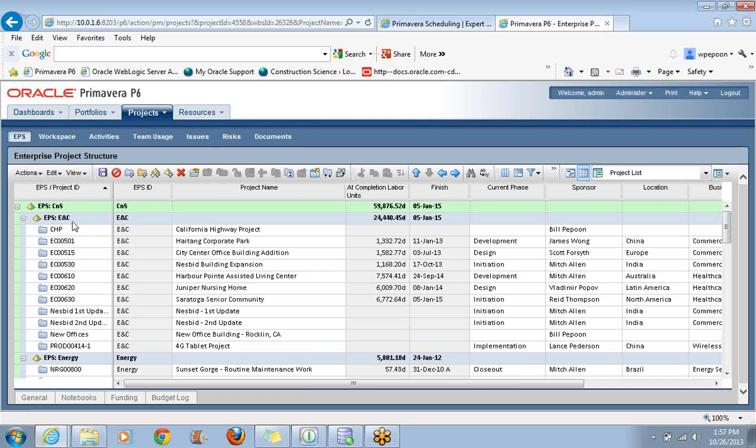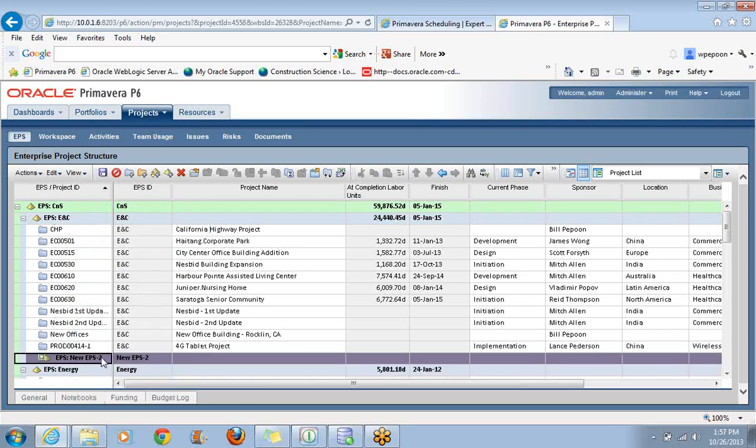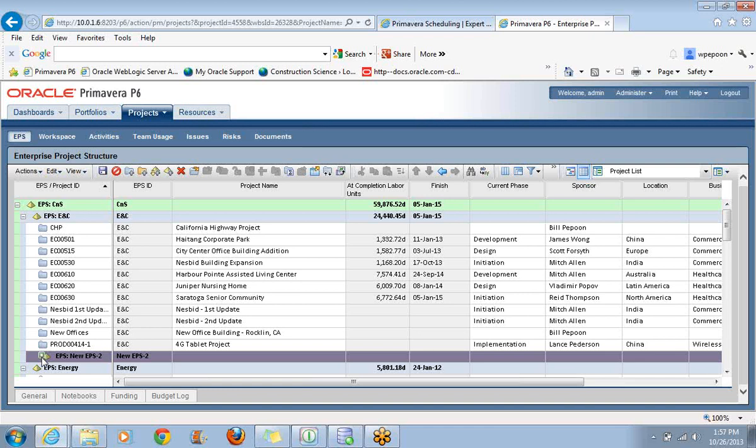We don't have an EPS button anymore. So what we do here is we highlight a part of the EPS, right-click, and you'll see that I've got the possibility of adding a sibling or a child. Sibling would mean I'm adding something that would be on the same level of the EPS. If I highlight this and add a sibling, they're equal. The child would be below this. I'll right-click and put in a child. You can see how it's a bit indented.